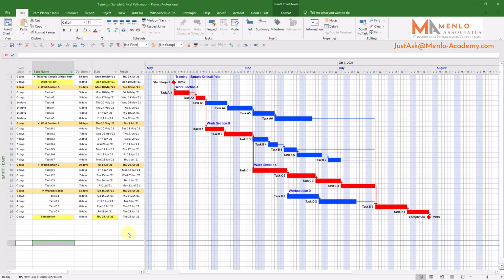In this video, we're going to look at how to create a baseline and then set a status date. In construction, the terms of the contract usually call for regular updates of the program, along with progress reports. The purpose of these is to identify any changes or risks which may have financial implications or create delay and impact the planned completion date. This is where the baseline comes in.